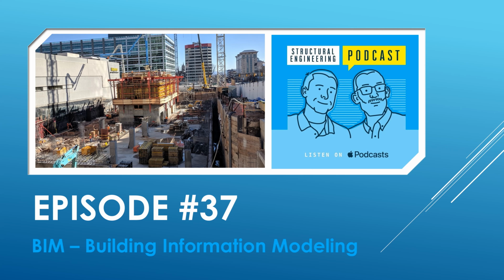Absolutely. There's a nice list that we've got from the internet here, and figure it might be fun to go through a couple and see what you think. So we've been harping on number 1 from the list, actually, which is better collaboration. Number 2 we've got is model-based cost estimation, right? You can get a way clearer picture of the actual building when you have all of the information already in a model, right? This is, instead of doing your takeoffs by measuring all the beams and figure out how heavy they are, Revit can just tell you. You don't have to do anything. That doesn't really affect the structural side. Probably it would hurt us because then when we change something, it's a little clearer.